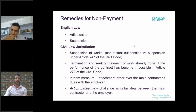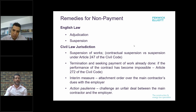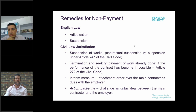The adjudication process is implied in construction contracts in England, Wales and Scotland and is compulsory. The decision of the adjudicator is binding on the parties and can be enforced by the courts in the interim until the dispute is ultimately determined by the courts or through arbitration. In short, it provides a swift remedy for contractors, subcontractors and further down the supply chain for non-payment from those immediately above them.